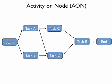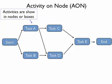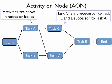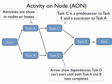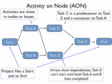In activity on node, the activity is represented by a node. These nodes do not vary in size to indicate relative amounts of time — they are simply ordered in a network. The activities are shown in nodes and boxes, and we can tell the precedence from the way these boxes are arranged and the arrows are used. For example, task D can't start until both task A and B have completed. The project also has a start and an end node.